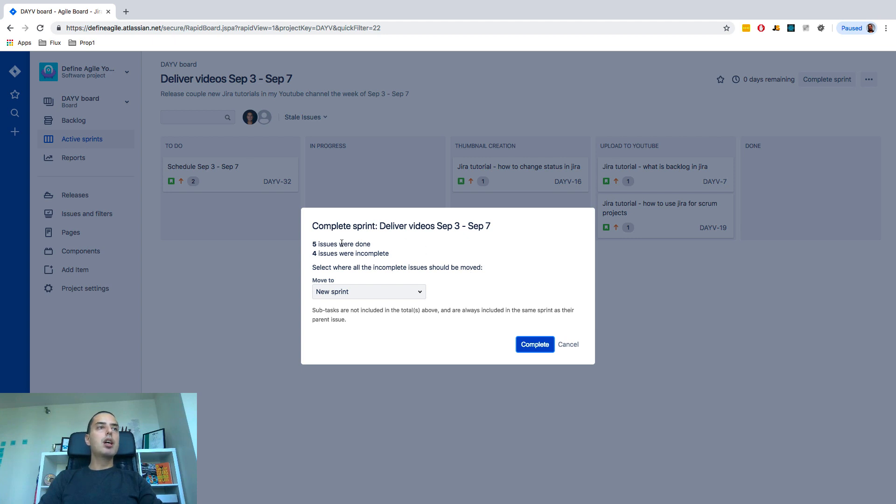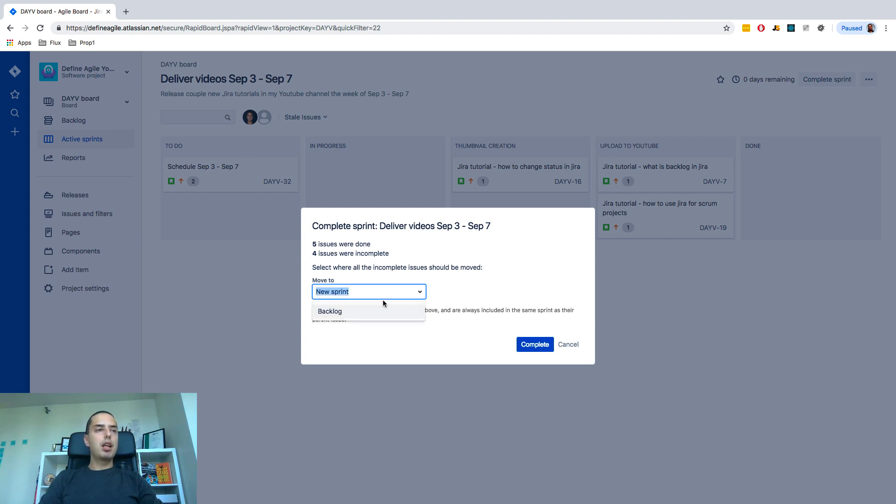it will tell me 5 issues were done, 4 issues were incomplete, then you can select where do you want those issues to go. There are two options, either they can go to a backlog or they can go into new sprints.